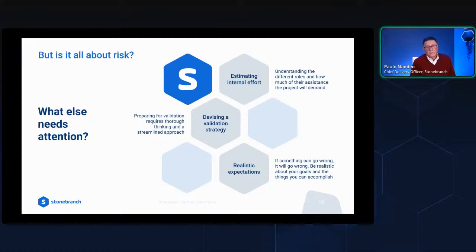And also, this needs to be taken into account while planning for the project, because if you split the groups of jobs in such a way that the same application is engaged in 5 of your different waves, you are going to keep that application team engaged for the whole time, right? Whereas if you concentrate all the jobs of a different application in a single wave, you can concentrate the impact to a certain application to that particular wave, right? So there is a lot to do in estimating the internal effort here.